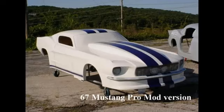Scenario: LJRC is building a new top fuel dragster for the upcoming season. The project has a tight 8-month timeline with distinct phases: design, 1.5 months, procurement, 1 month, fabrication, 3 months, assembly, 1.5 months, and testing, 1 month. To secure funding, LJRC partners with Apex Lubricants, a major oil company, who agrees to sponsor the car in exchange for prominent branding and logo placement.